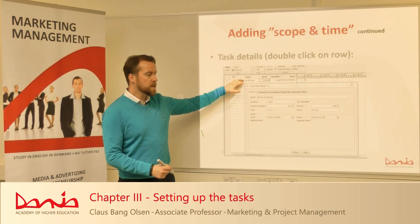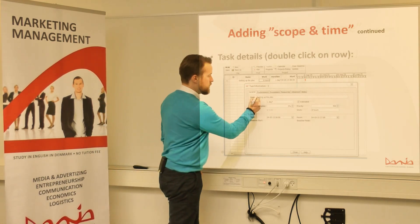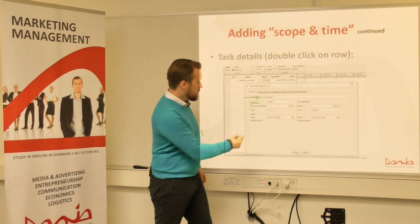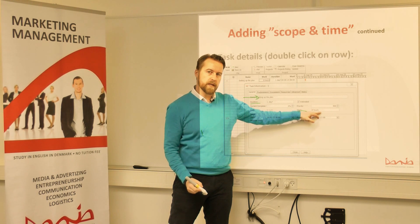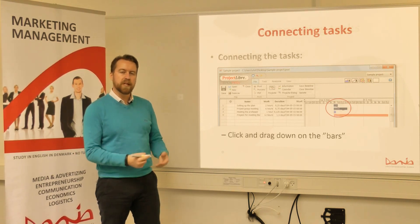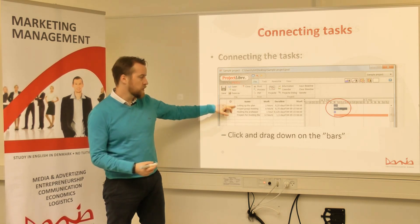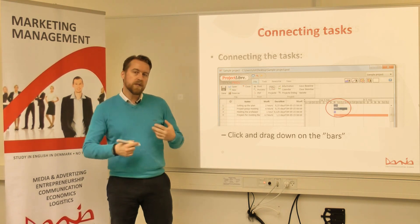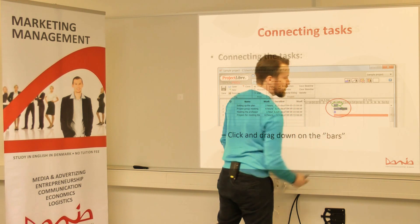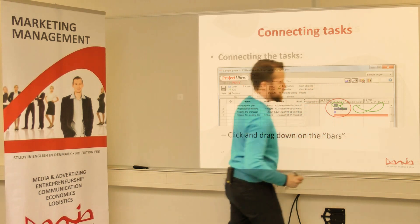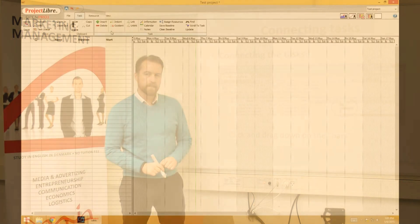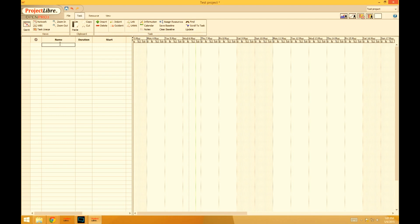When you double-click on a task, you'll get the task information. In the task information, you can adjust the name of the task, adjust duration, and work. Work here we set for eight hours. When you have filled in all the tasks that you need for your project, the next step is connecting them. There's a natural link between some of your tasks — for example, you need to set up your project before you can do the group meeting. The way to connect tasks is by clicking on the task you want to connect from, dragging to the task you want to connect to. You'll notice this infinity symbol — letting go of the mouse cursor on the next task will connect these two tasks.